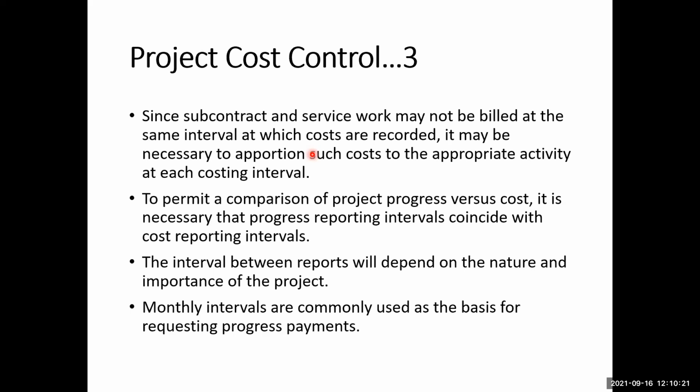At the time of recording the activities for the direct labor and the equipment cost, some estimated cost for the subcontractor or the services work can also be included into that activity, so that the recording of the costs for those activities is timely.